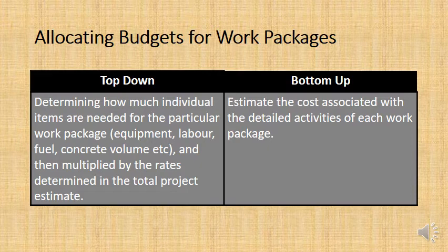But the issue is there is also a cost of installing the crane and mobilizing the crane and bringing it to site. And so while the crane costs $250 every hour that you use it, there was also an additional $10,000 of cost to establish the crane at the site, to bring it from the yard, to hire it from the company, and to install it on site so it could be used for building this high-rise building. Well, what work package is actually going to allow for that in the budget?